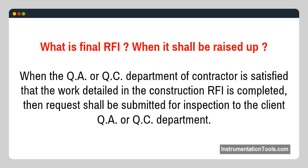What is a final RFI and when shall it be raised? When the QA or QC department of the contractor is satisfied that the work detailed in the construction RFI is completed, then a request shall be submitted for inspection to the client QA or QC department.